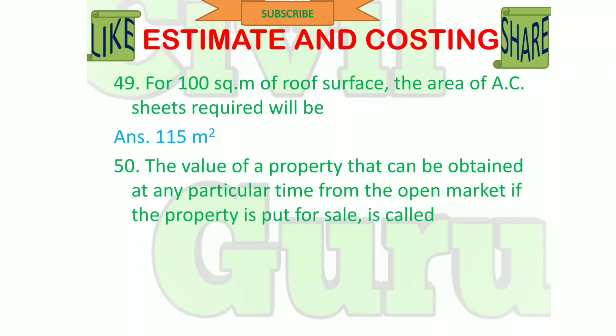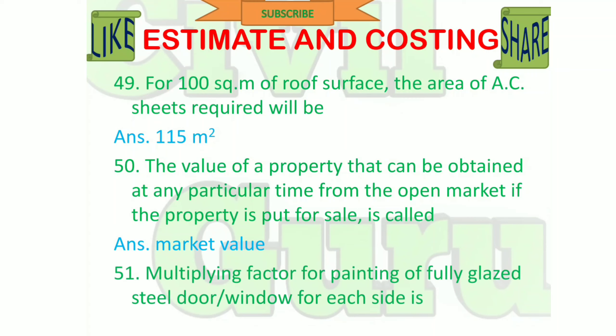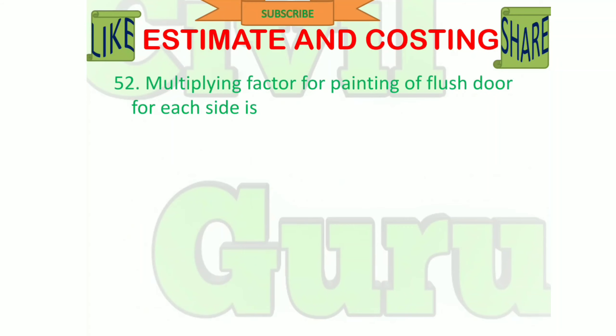The value of property that can be obtained at any particular time from the open market if the property is put for sale is called market value. The multiplying factor for painting of a fully glazed steel door or window for each side is 0.5. The multiplying factor for painting of a flushed door for each side is 1.2.